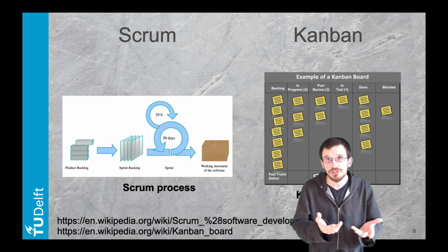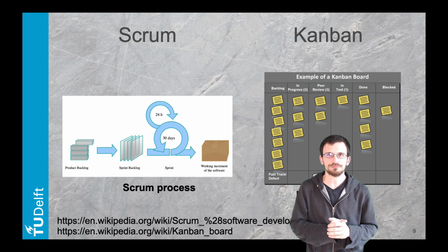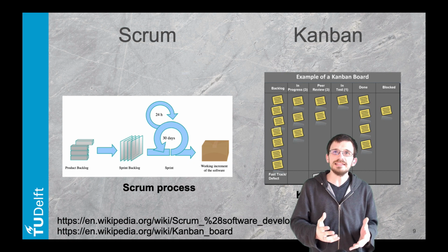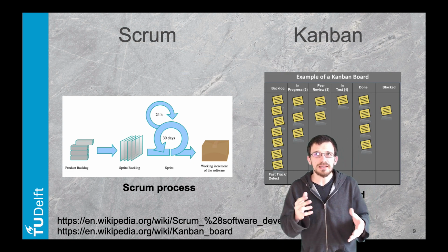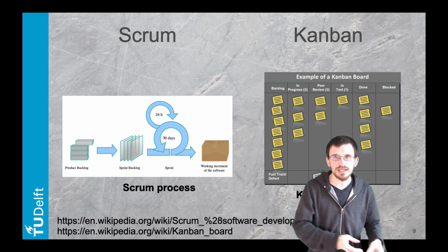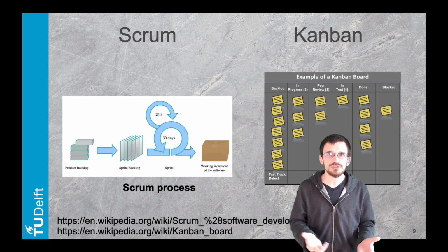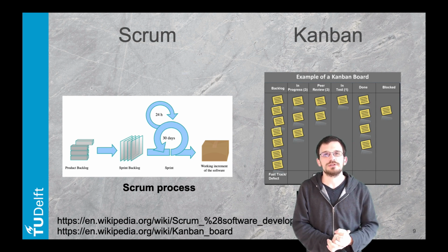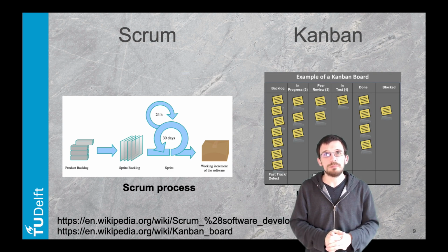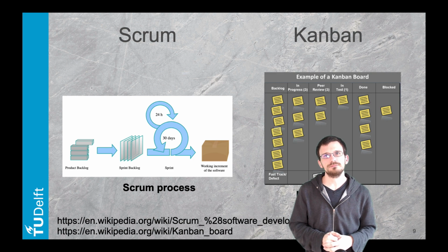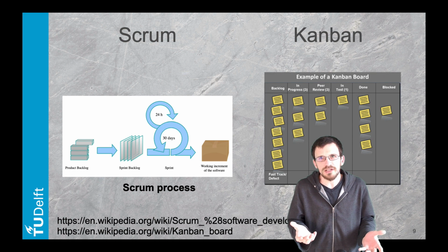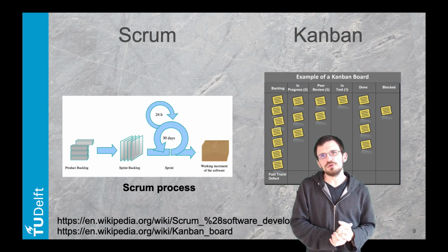Scrum is a framework of agile development revolving around sprints, which are development iterations of 2 to 4 weeks. The release of a new product version takes place at the end of each sprint. The team defines the tasks and goals for the sprint and sticks to them for that sprint's duration. The key metric is the velocity, how much work is completed during a single sprint. The team cleans up the board after each sprint, and it suits long projects well with cross-functional teams.